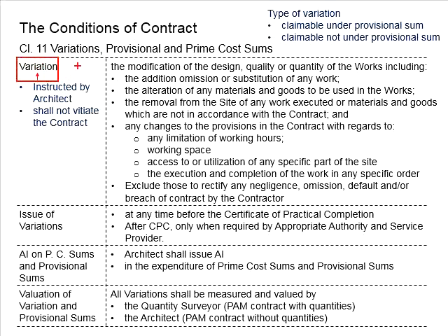Theoretically, these variations should not vitiate the contract. It means that it shouldn't affect the contract. The contract will still need to be valid, and only for a certain part of the work which is relatively minor as compared to the overall project, involve some modifications or changes, and those changes are related to the design, quality and quantities of the work.